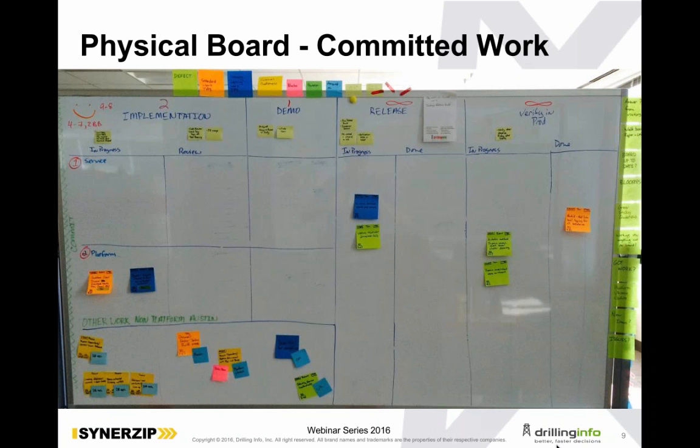So it really depends on the feature. Here at DrillingInfo, the features aren't necessarily hundreds of stories big. They're much smaller. Some of them are 5 stories, some of them are 1 story, some of them are 10 stories. And so if you're looking at a list of, say, 50 features, there's something called random branch sampling, where you can take a random set of those things and break them down, and then you can forecast how long that's going to take to actually move through your system based off the observed lead time that you've had. And so kind of back to the delivery rate, that equates to how many stories you're going to get done per week on average, and you can manage your risk and manage the project a little bit better doing that.